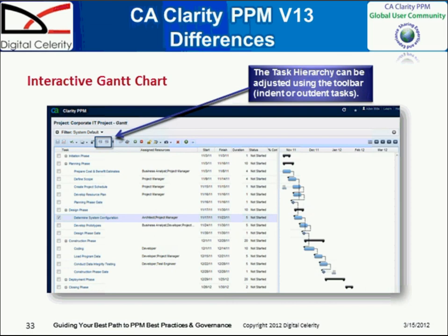And a lot of times, as a practice, I would set it up with a 0 allocation. That's just a practice I follow when I work with customers, so that someone has to put in allocation segments, but it will create them, yes.